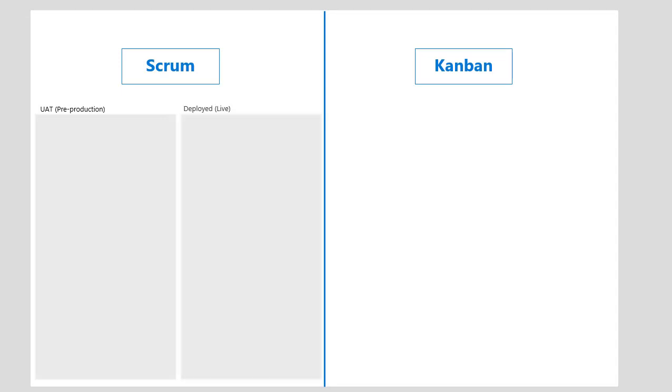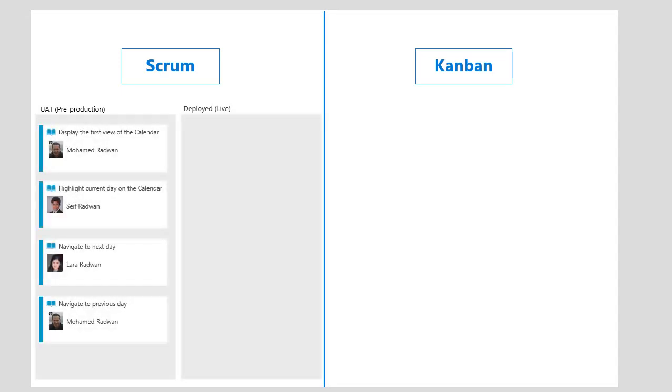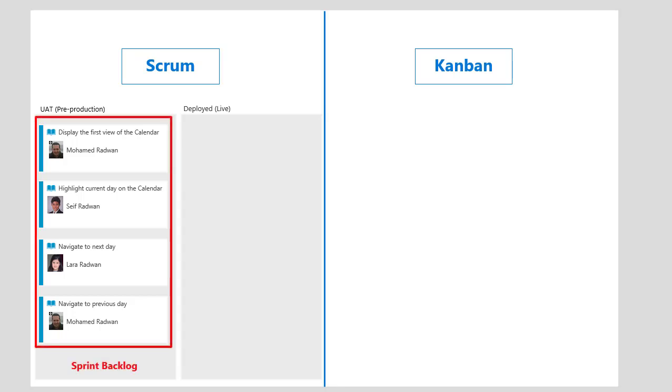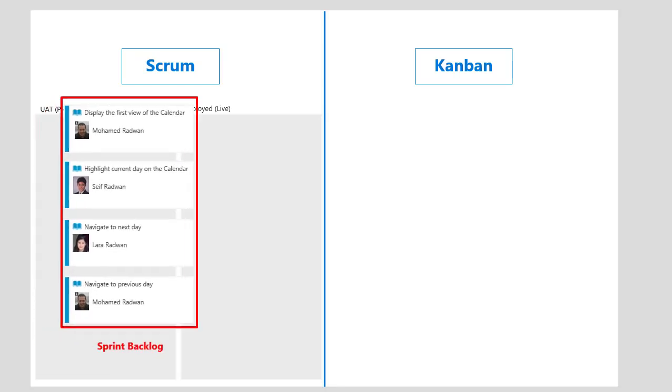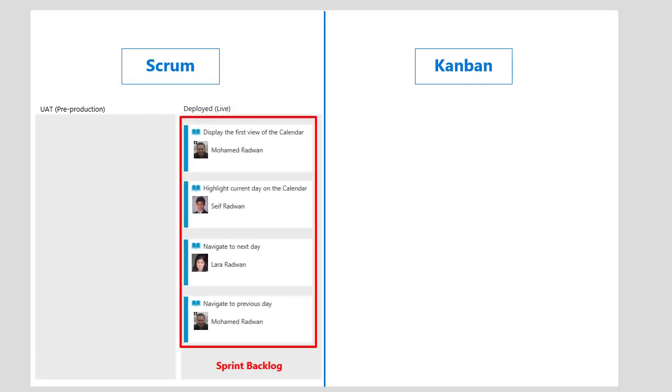When we have a Scrum, we usually have a sprint backlog. And even if we completed one item, we will not be able to deploy this user story or product backlog item to production, because we need to have a complete integration test and regression test with all the sprint backlog scope. And usually we will deploy all the sprint backlog in production.